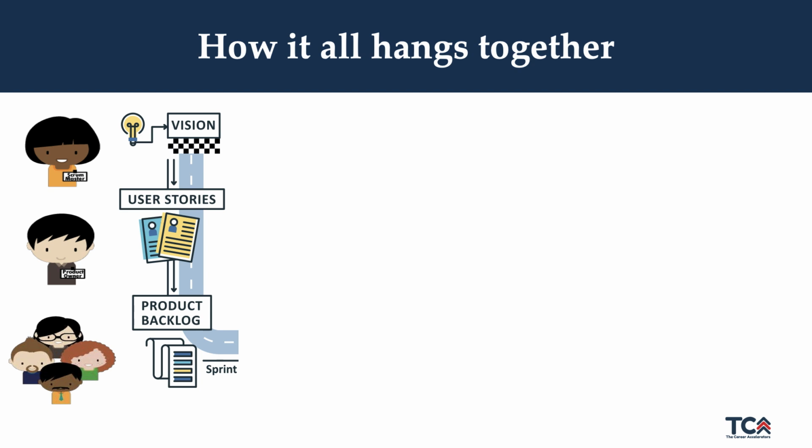Now, once we have an initial set of user stories, those user stories will need to feed into the backlog. It is the responsibility of the product owner to create the user stories. Ideally, the product owner should be creating this, but practically the product owner does this with the help of a business analyst. Once the user stories have been captured, they will feed into the product backlog. Remember, the product backlog is a living document, so there is no end. There is no point in time where the product backlog is closed and cannot accept user stories anymore. So if there are user stories 2 months down the line, they will still feed into the product backlog.